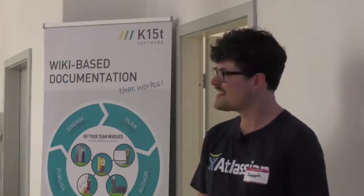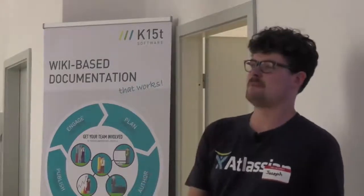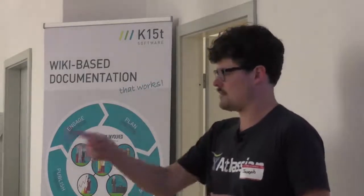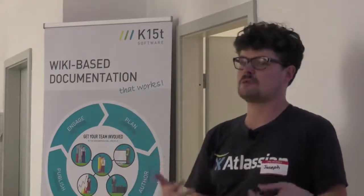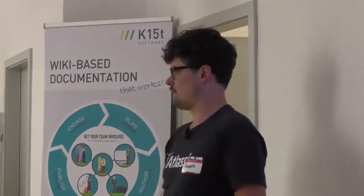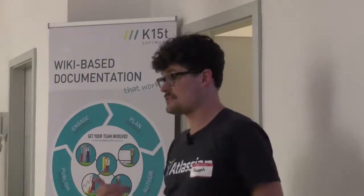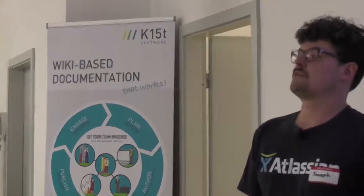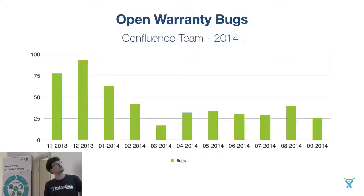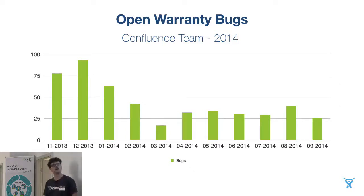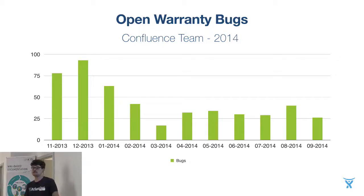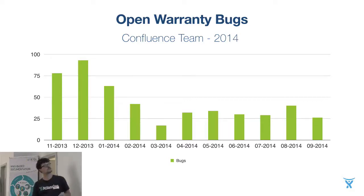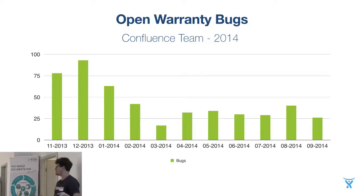And you might think, well, that sounds a bit mean. Why are you being so draconian about this? And I'm making it sound like really top-down, you must do this, you must fix this bug. But really, it's just about a way of making developers realize that they need to accept the consequences of low quality, right? We don't want our users to feel that pain. We want our engineers to feel that pain because it's their fault at the end of the day. So people weren't thinking about what happens in the delivery phase because there were no consequences for them. So this is what feature warranties looks like after a year. So we started this in 2013, and now here we are halfway through 2014. And you can see, actually, at the start of 2013, we were in pretty bad shape. At any point in time, there were at least 100 bugs that we knew about which were caused by new work in the releases that happened during that year. And you can see, suddenly, we got way better at it. Now we're down to like 25 or 30, which is still not perfect, but wow, that's like a third of what it was at.